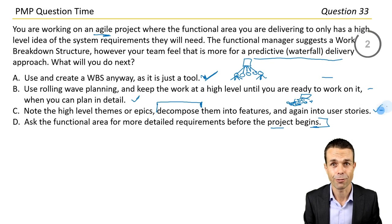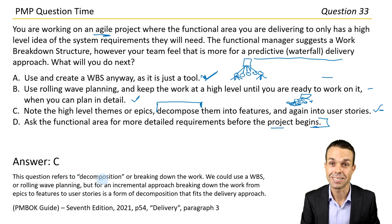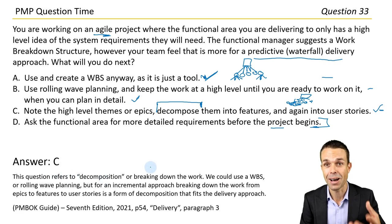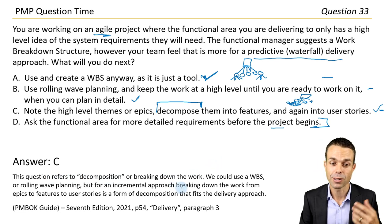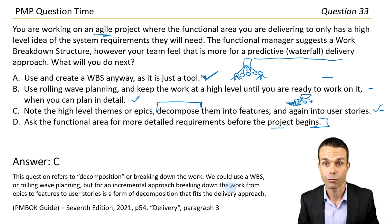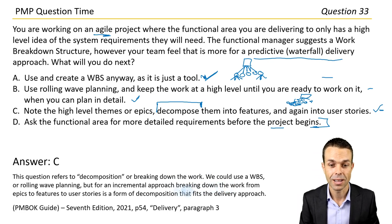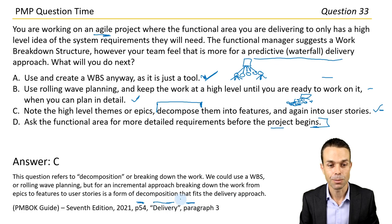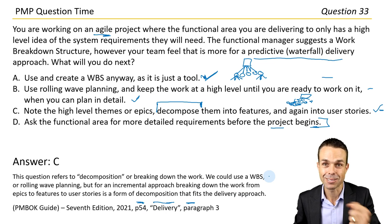All of these are pretty good, but the best one for an agile approach is answer C. This question refers to decomposition — breaking down the work. We could use a work breakdown structure or rolling wave planning, but for an incremental approach, breaking down the work from epics into features to user stories is a form of decomposition that fits the delivery approach. Page 54 under delivery, paragraph three, PMBOK Guide 7th edition.